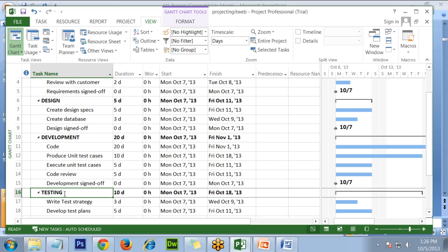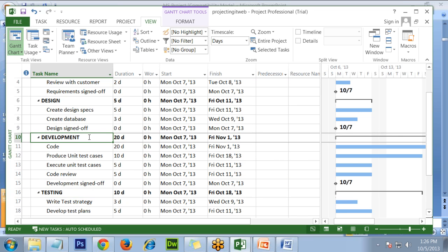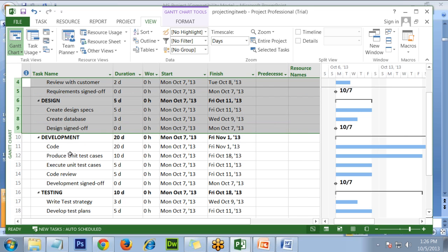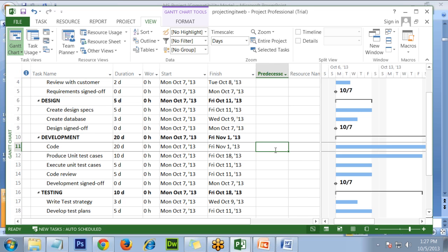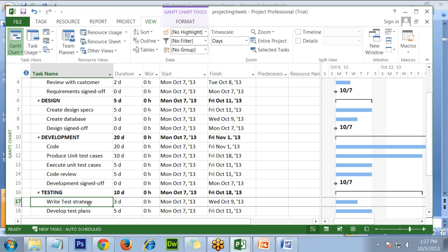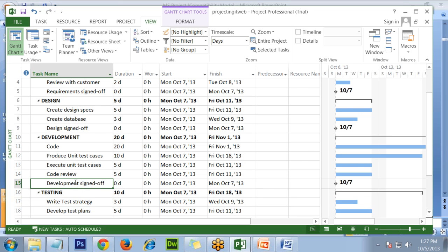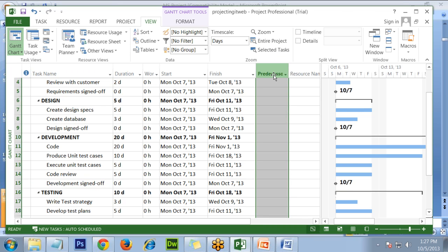However, if you want to show which project you are dependent on or which project is dependent on you, then instead of having these tasks, we will connect our project activities to those projects. And we will also connect other projects, making them dependent on our project task. That we will do when we come to the dependency topic. Okay? We'll discuss that. But yes, you can do that. You can dynamically link project tasks to other projects. Yeah? So your project dates can be identified using other project dates.